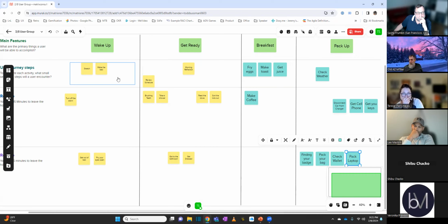Where literally the goal is for this top row here, this is not the final product. This is everything you could possibly think of that people might want. And then you start removing them one at a time. Do we need this immediately? No. Can I get away with doing it in 6 months? Can I wait a year to do it, etc.? So slowly answering those questions and ultimately discovering what your MVP is.